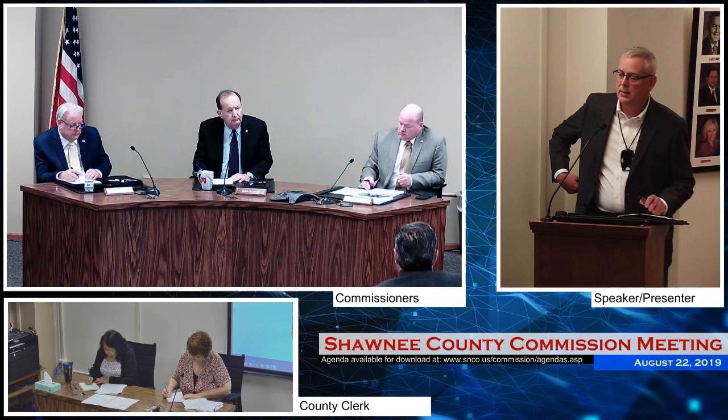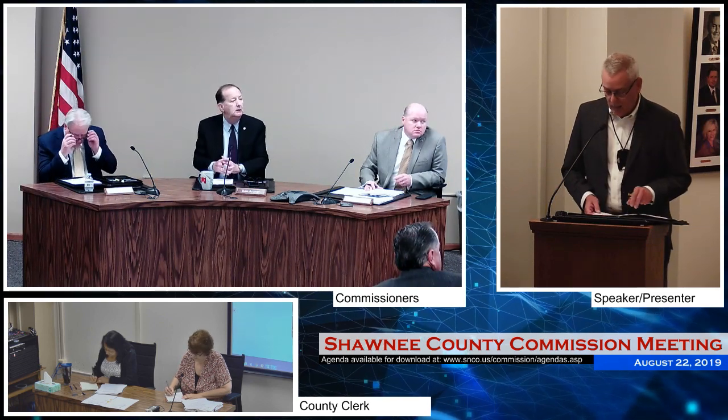Good morning, Commissioners. Kurt Niehaus, Director of Public Works. Back on April 11th to be exact, the Commission approved our request to issue RFQs for the replacement of 2 structures. They're reasonably close together. And after considering all the proposals, the selection committee unanimously selected Finney and Turnipseed to do that work. The contract amounts for each bridge is $44,100. That covers both design work and construction engineering.